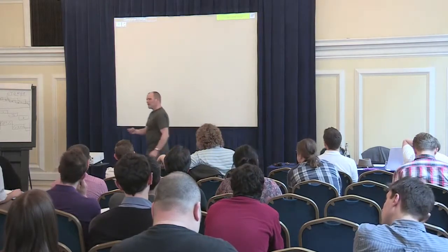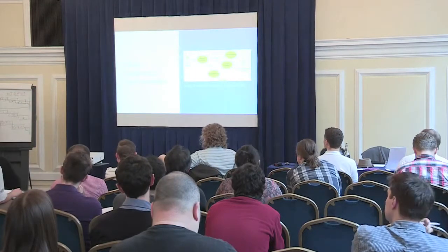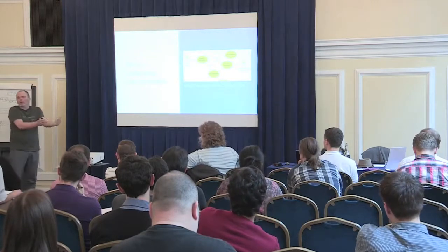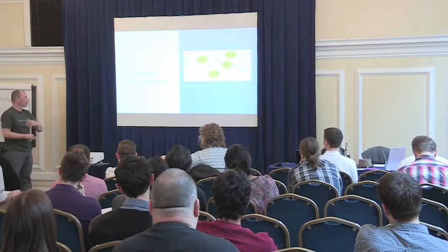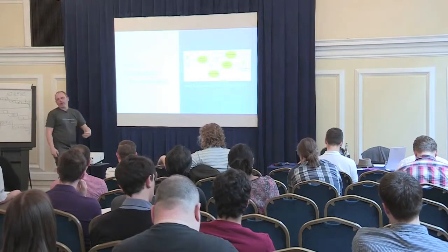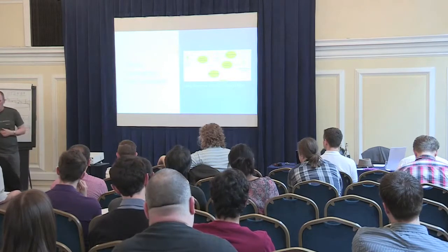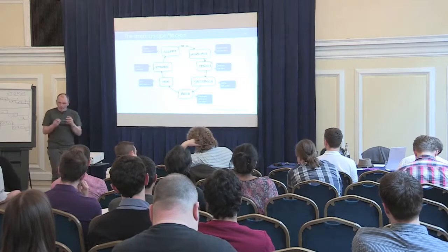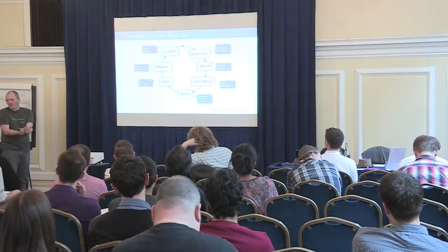So once you identify the model, this is basically where we get out of these preliminary iterations. So here's the model, here's the estimate. And if you know how many points you can do per iteration, or how much a point will cost given your specific team setup and organization setup and the culture and whatever you might have, you can start building. And you can do a very decent estimate of the size of your project. So once we've done that, we start implementing them. So we move into the actual part of the project that is building stuff, right?